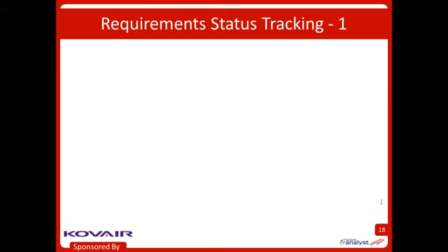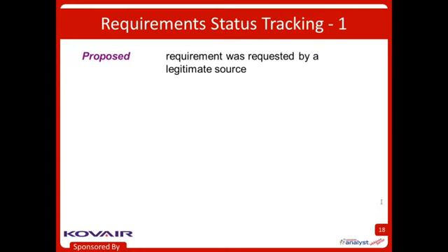Of the 71 requirements, 35 are implemented and verified, 27 are implemented but not verified, and 14 are still not implemented yet, or whatever that adds up to. Well, I would feel like we had a much better handle on just what was involved with that chunk of work and where we were instead of saying 90% done. So here are some possible statuses that you might consider.